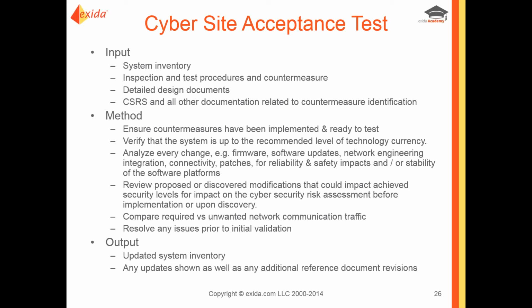Any changes that have been made at any time, you want to make sure that all of those changes have been adequately reviewed and analyzed. These could be firmware, software updates, network engineering integration, connectivity patches, any of this stuff. If changes have occurred, you want to make sure that the change has not compromised the system at the very least, and in some cases hopefully made things better. But unless you look at it and analyze it, you don't know.